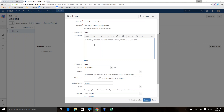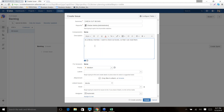Student question: in use cases, we had preconditions like 'the user must be a library member' — in user stories, do we take that for granted? Answer: No, you can specify preconditions as part of your acceptance criteria. There is also another format called 'Given-When-Then' which we can discuss in the next session. But yes, you can define your preconditions as part of your acceptance criteria.